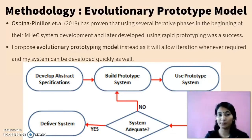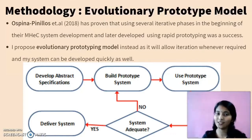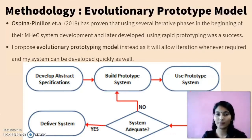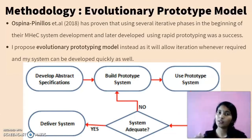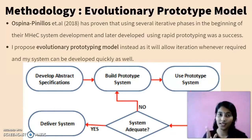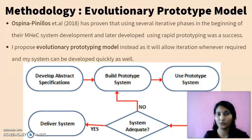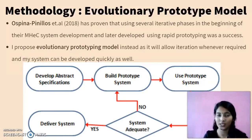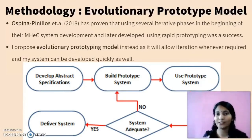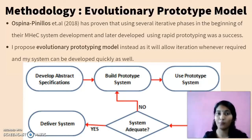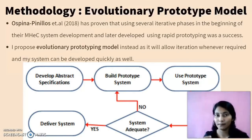As we see in the chart below: develop abstract specification, build prototype system, use prototype system, and system adequate. For system adequate, we can go two ways — yes, which leads directly to the delivery system, or no, which means we iterate the system again. The evolutionary prototype model is very helpful and suitable for my project.